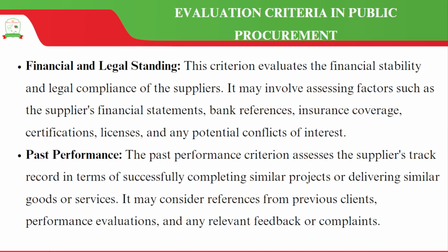The other one is the financial and legal standing. The criterion evaluates the financial stability and legal compliance of the suppliers. It may involve assessing factors such as the supplier's financial statements, bank references, insurance coverages, different forms of certification. Do they have them? Different forms of licenses. Do they have them? Potential conflicts of interest. So these are very, very critical questions that we continue to ask as we do evaluation.